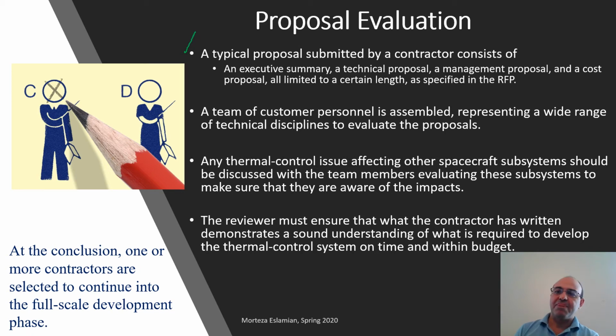So to the customer, cost is very important. The first thing they look at in the proposal is, oh, let's see how much it is going to cost, right? So if the budget, the cost, is too high, even if it is technically sound, the customer may not pay enough attention to the proposal. So the cost is important, and all of these are limited to a certain length. People who want to respond to a proposal are usually told to write it within limited pages with several sections.